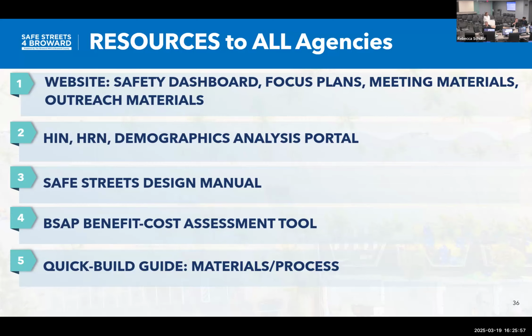There is this idea that getting projects listed in our MTP, even if it's illustrative, we don't have funds identified, that will help open up the way to apply for some different federal grants. It'll show that there's a community, a regional support for it, that it's an important project. So there's a variety of different ways that we can help look at stuff.